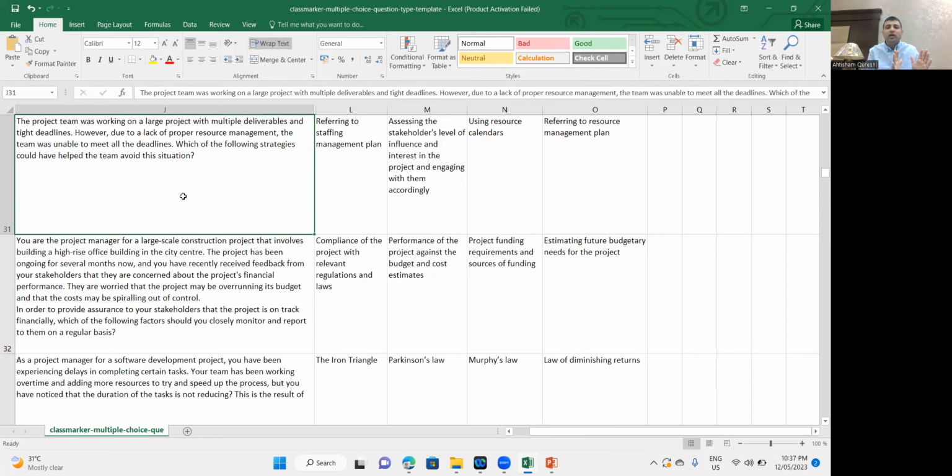The only issue that could have been managed well is the surprise, like my brother's marriage is there, and I already applied in January for this vacation, I have to go. But if you have not synced your resource calendars with the key milestones in your project, definitely resource unavailability will become your key issue.